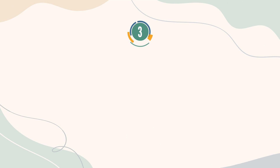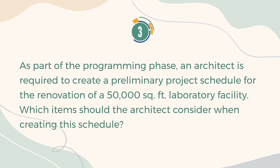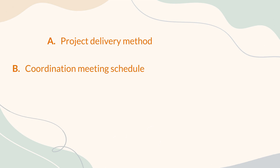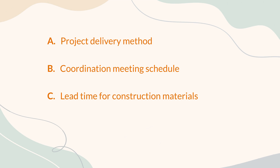Number 3. As part of the programming phase, an architect is required to create a preliminary project schedule for the renovation of a 50,000 square feet laboratory facility. Which items should the architect consider when creating this schedule? A. Project Delivery Method. B. Coordination Meeting Schedule. C. Lead Time for Construction Materials. D. Shop Drawings.